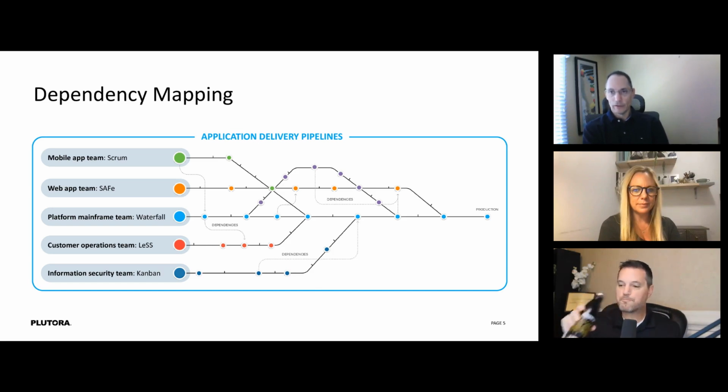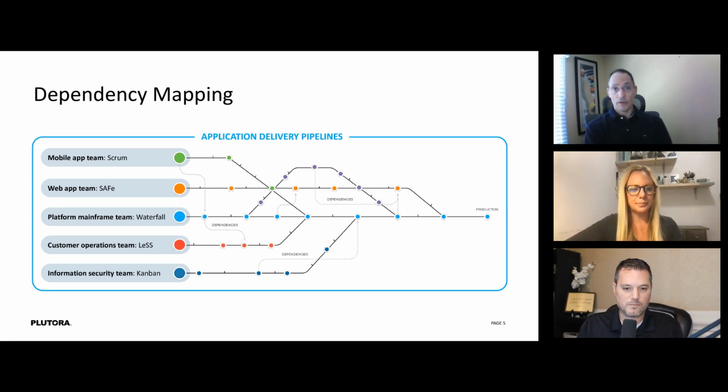So there's a critical piece of what's being delivered that's having challenges, or the business owner isn't willing to sign off on it in a certain state because it doesn't satisfy the need, or maybe because there's a real defect, like it's allowing some private information to be seen, or whatever. But it's typically going to be a defect, right? And it's a defect that we're not willing to sign off on. Sometimes it could be because of a third party. We have a lot of dependency on the state, because sometimes there are laws and things that go into effect that we have to support, and there have been times where the state's not ready, and so we have to delay because the supporting component's not ready.